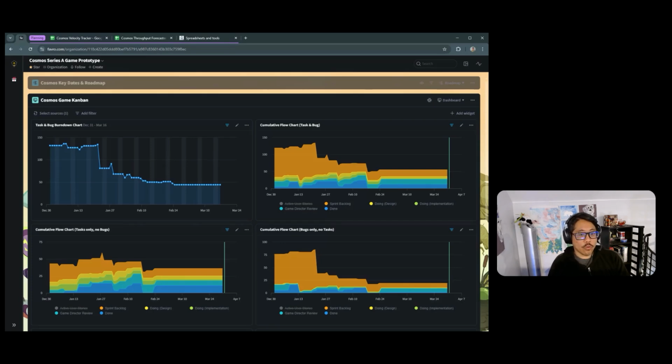But in the case for Sprocket, I wanted to experiment with the no estimates movement to see if we could get the cards generally approximately the same size, the ones that are actually moving through the backlog during sprints. We could just use card flow as opposed to estimation flow. And in practice, that has turned out to be a sufficient level of estimation.